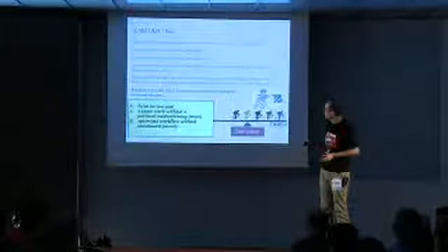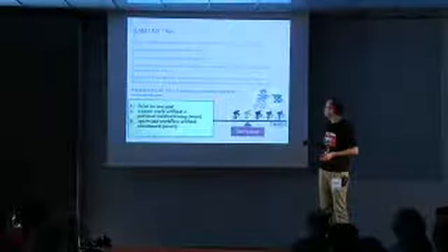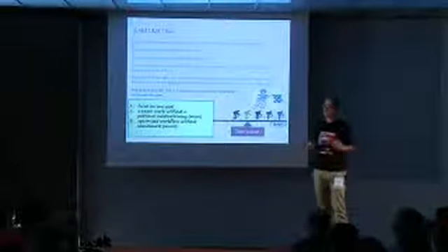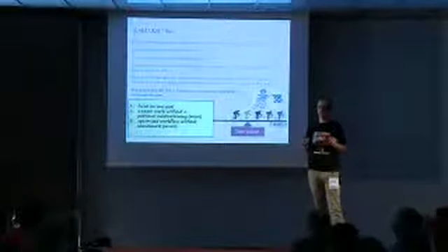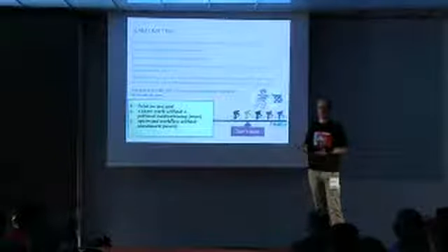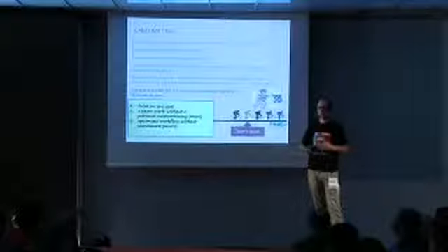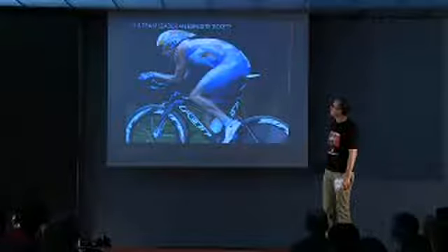And the third point is an optimized workflow. If you take a look at it, the cycle time and lead time here, terms coming from Kanban, are almost equal, right? There are no delays, no gaps. The flow is continuous, and ideally there's no drop in the speed of the whole team when the leading guy is changing in front of that. Okay, let's try now to take a look at the wider perspective.